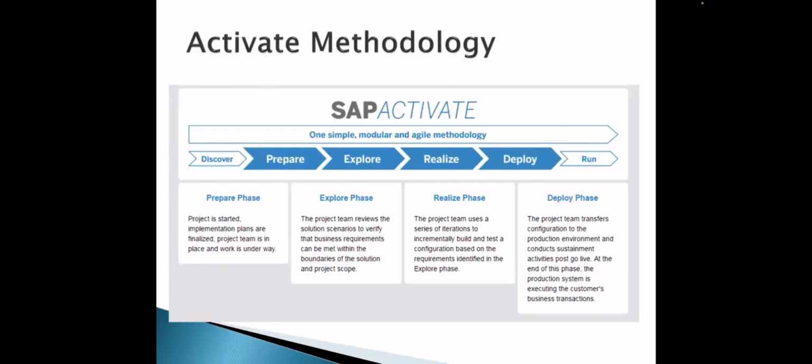All these discussions, understanding the as-is system and as-is process, and how we can set up the SuccessFactors system to enhance their end user experience, should be done in the explore phase. It's all about discussions, understanding, debates, taking the requirements and documenting everything. That phase can go for around 6 weeks. The explore phase can range between 4 to 6 weeks, based on the various discussions.